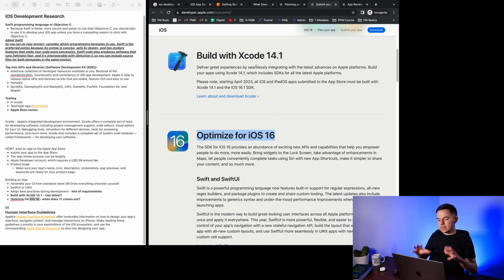The same goes for this Xcode 14.1 version. So it means that we need to use the latest stable Xcode for our development, but there is a good chance that there will be 14.2 or maybe 15th version of Xcode. So these are 2 points that we should keep an eye on, or at least discover if there are updates coming out, so that we will be ahead of the curve and take action before it hits us, especially if they will want to release their updates by the time we want to go to App Store and release our application.